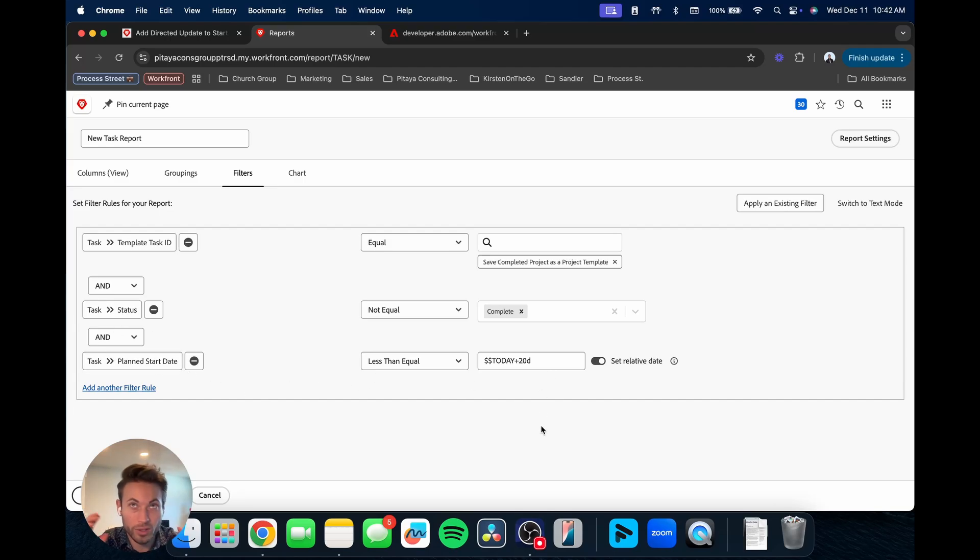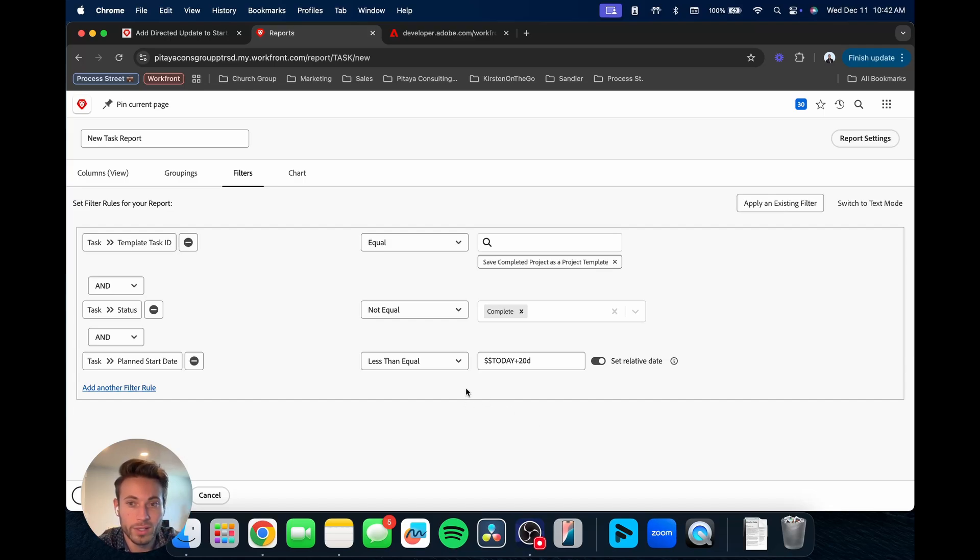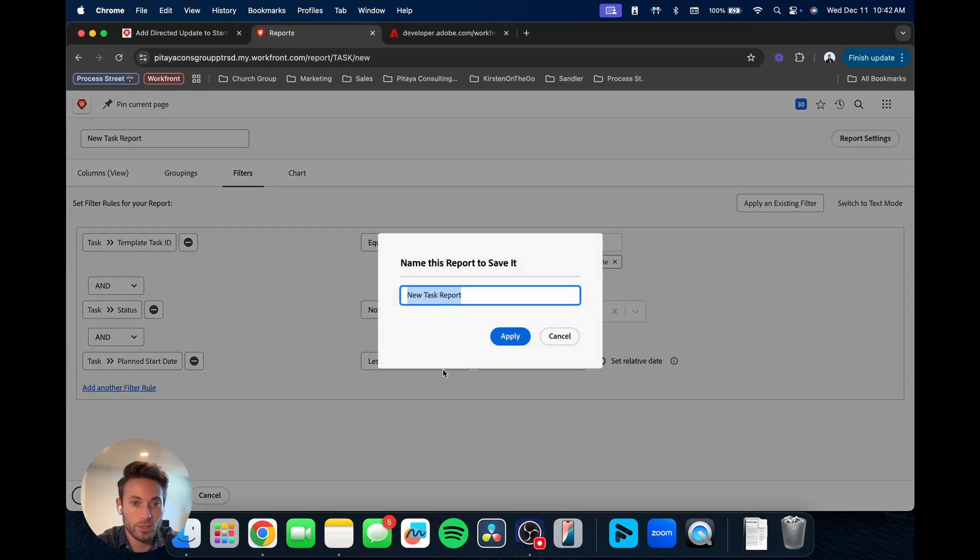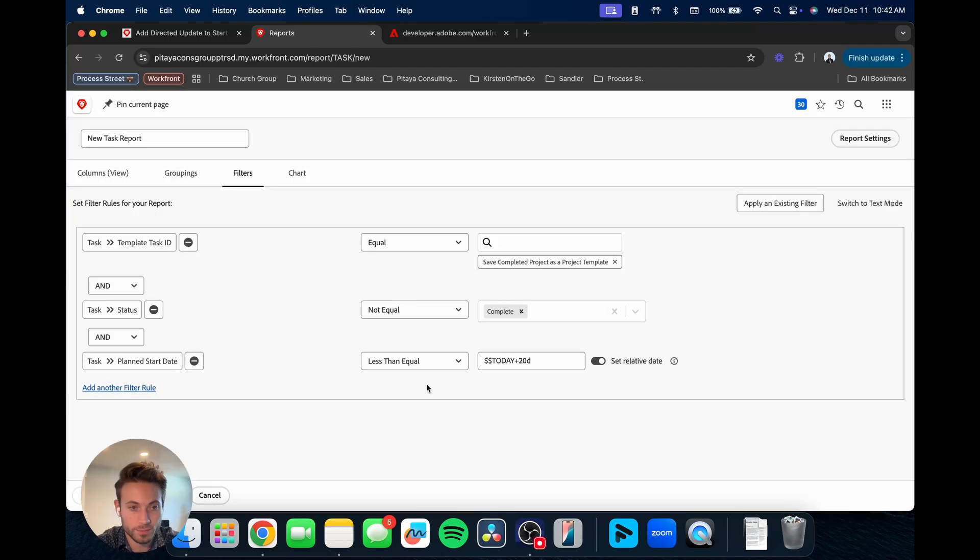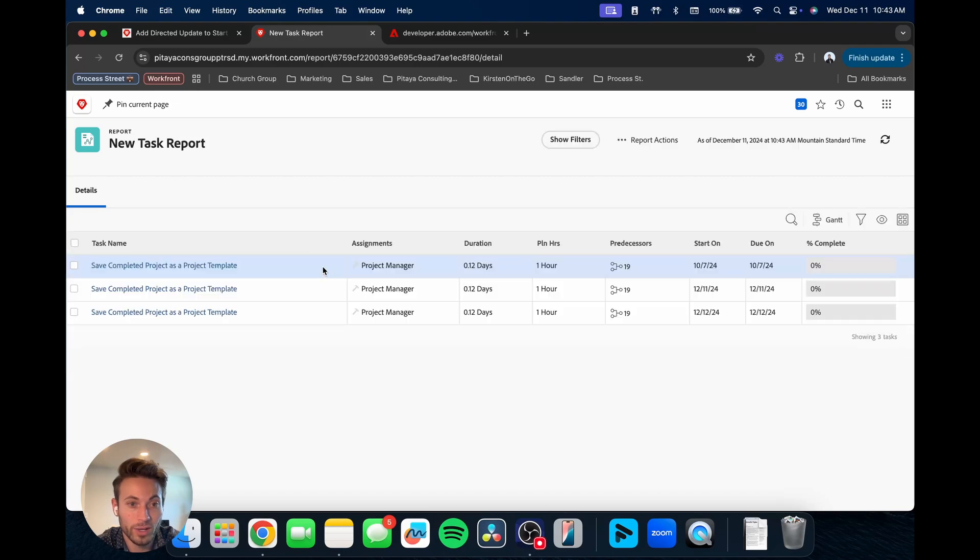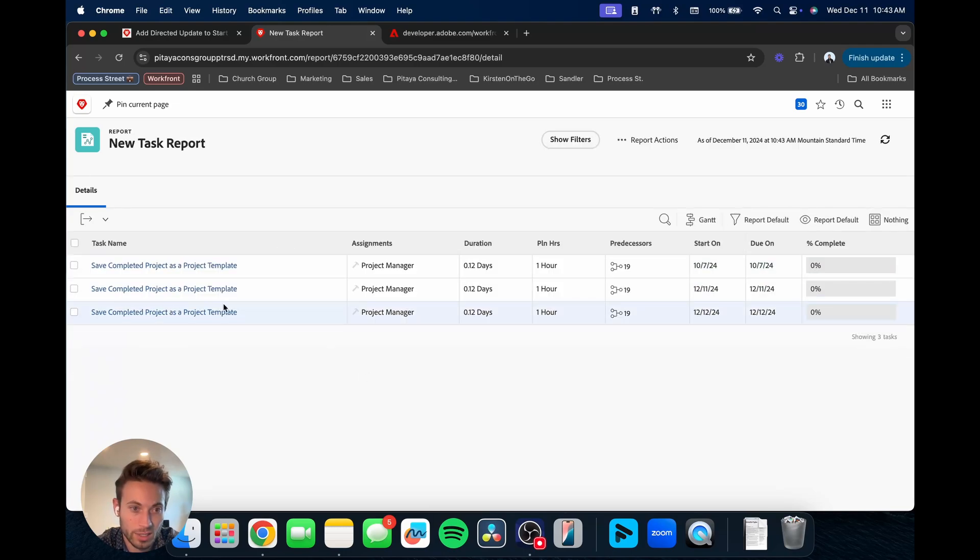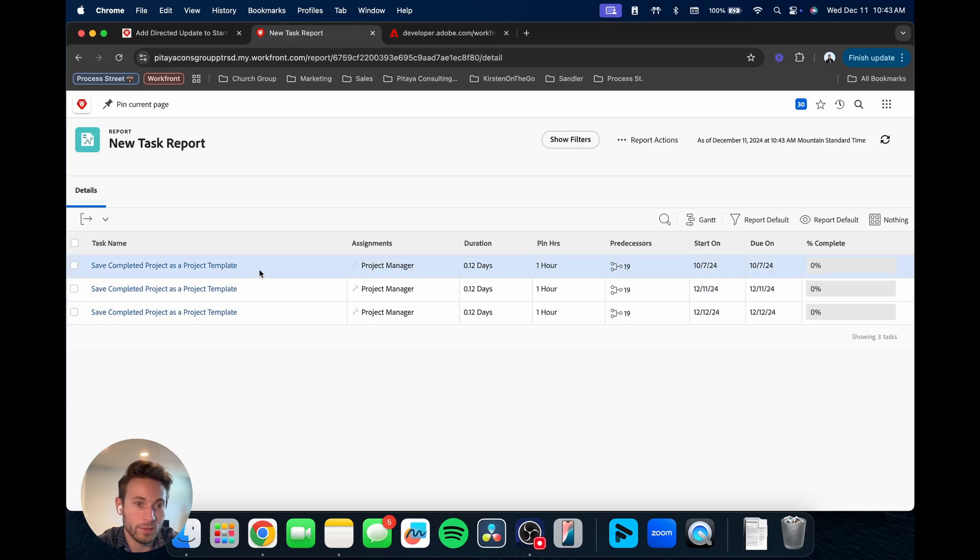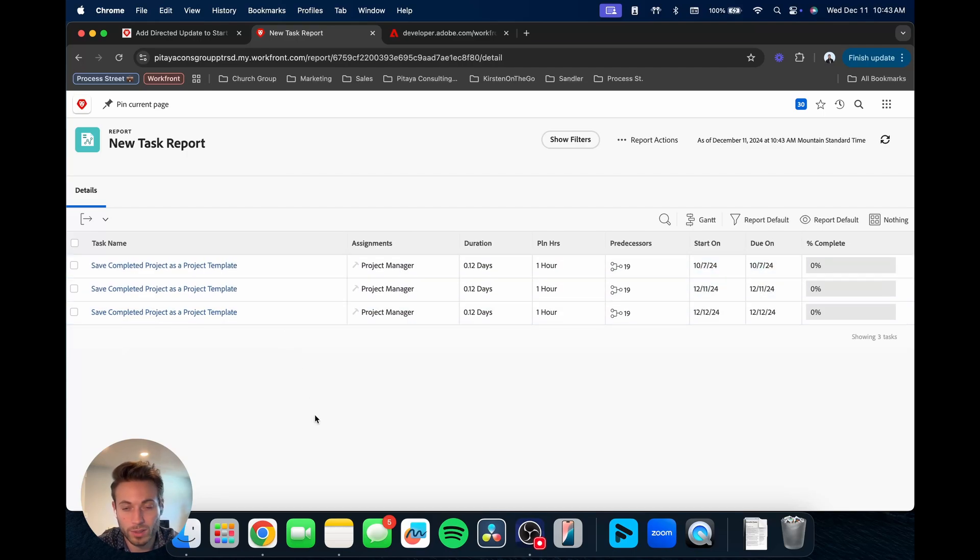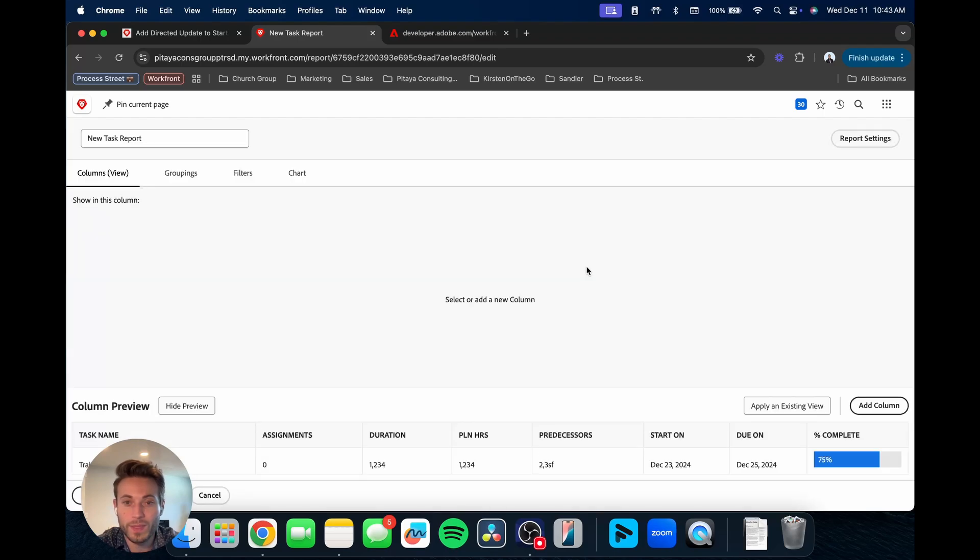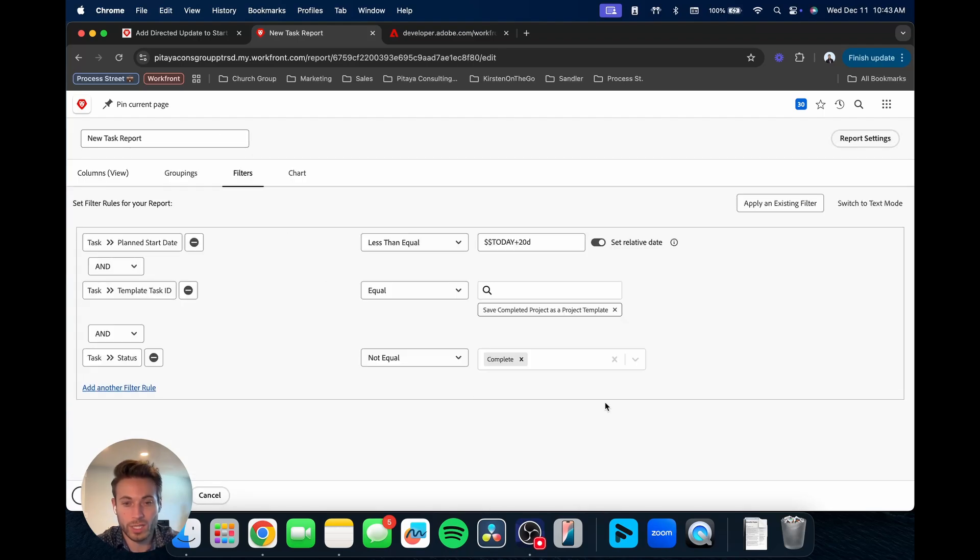We'll just do today plus 20 days, and not equal to, we want it less than, we'll say less than or equal to. Today plus 20. So then as we're thinking through it, this should filter out and give us the results that we're wanting. It's going to be this template task ID, the status is not complete, it's planned to start within next month.